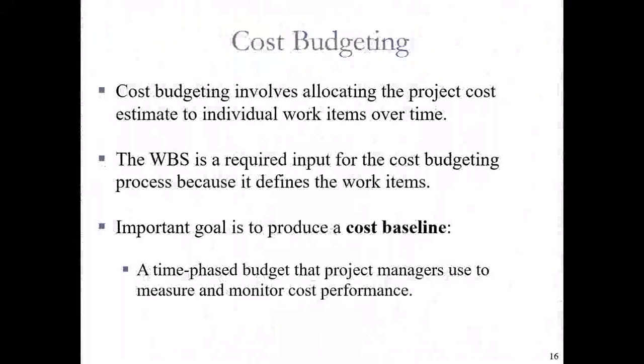Cost budgeting involves allocating the project cost estimate to individual work items over time. The Work Breakdown Structure is a required input for the cost budgeting process because it defines the work items — you need the breakdown before you can cost anything. That is why, before you cost anything, you have a work breakdown strategy. The important goal is to produce a cost baseline — the one on paper that will not be exposed to changes on the ground. It is a time-phased budget that project managers use to measure and monitor cost performance.